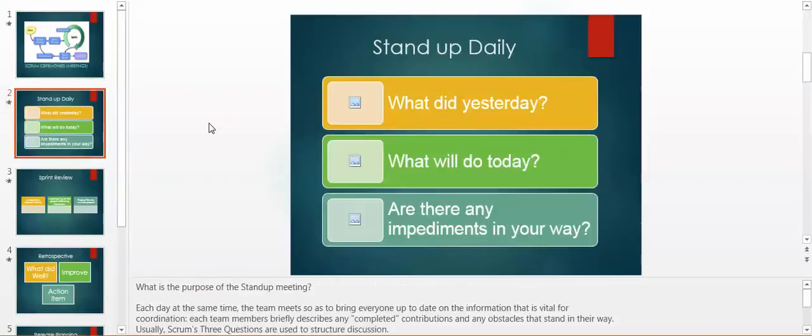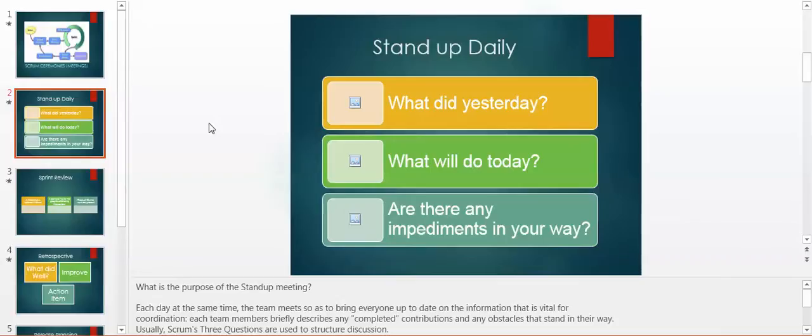We start with the standup daily meeting. What is the purpose of the standup meeting? Each day at the same time, the team meets to bring everyone up to date on the information that is vital for coordination. Each team member briefly describes any completed contribution and any obstacles that stand in their way.